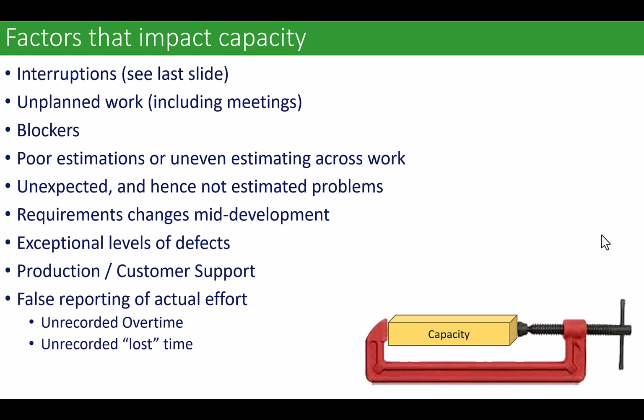To be clear, the business has every right to adjust the requirements. They absolutely do. Business changes, situations change, priorities change, funding changes. They absolutely are entitled to change the direction of a project. But if they do it in the middle of the execution, like mid-sprint, then we have created an enormous disruption where we have to stop what we're doing, make a new plan, get everybody to understand the new plan, and then execute the new plan, throwing out our commits for whatever planning period we're in.